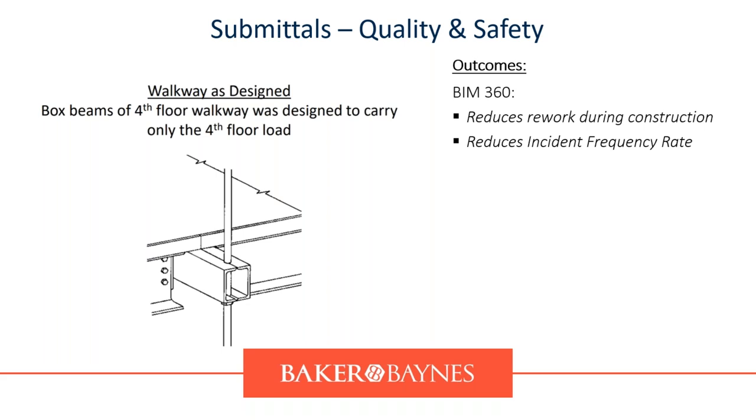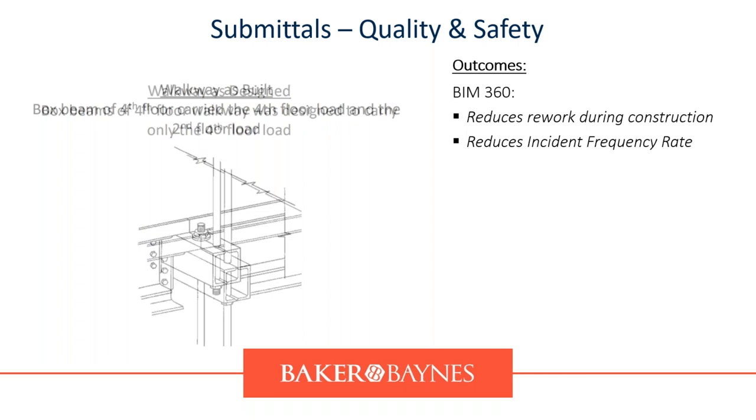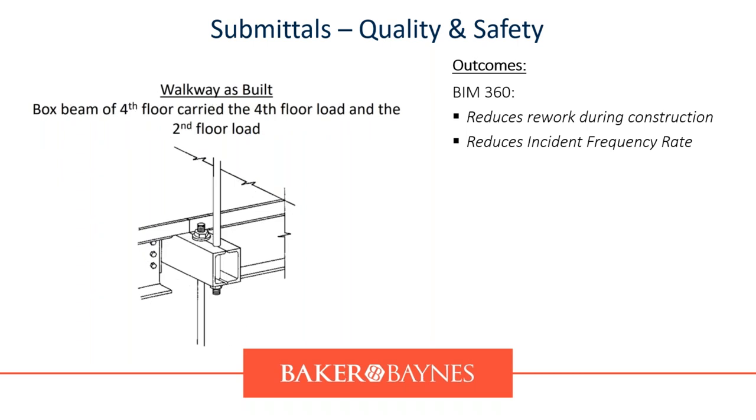So originally the walkway was designed with a box beam of the fourth floor, and it was designed to carry only the load off the fourth floor, like you can see in that image. The walkway, however, was built slightly differently. So box beam fourth floor carried both the load of the fourth floor and the second floor. So if this in today's technology world was submitted as a submittal, an engineer would have looked at this going, sure, supporting two loads, I'm probably not going to approve that.